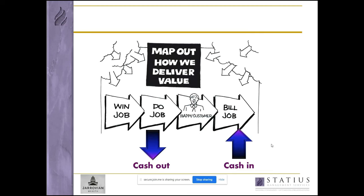However you define them, it is these processes that we want to make slicker, faster, better, cheaper — whichever adjective you wish to apply. In very simple terms, you invest cash at the beginning of the cycle — on-site setup, materials, equipment, staff and subcontractors — and you get cash back at the end of the cycle when the customer hopefully pays. Additionally, as some of that cash is often delayed a year or two with retentions, cash can take a long time to come back into the business. Used properly, these systems diagrams with complementary tools like lean, Pareto and proper performance measurement can help you eliminate waste, improve your cash-to-cash cycle and drive cash to the bottom line.